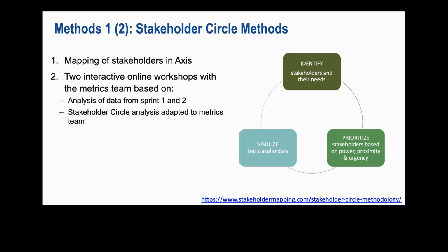Then you try to talk about how to prioritize them. At this point, it's also important to think that priorities are not always easy to define. You might say, okay, maybe this stakeholder is prioritized in this context, but not really prioritized in that context. You should also suggest focusing on proximity: how close the stakeholder is to your team, both geographically, but also in terms of interests.